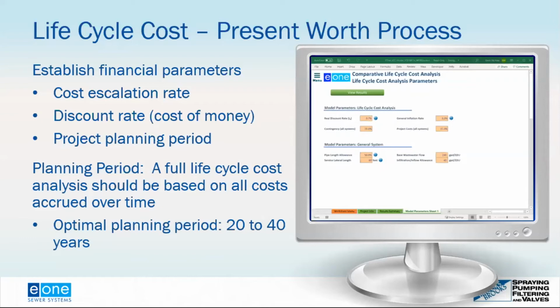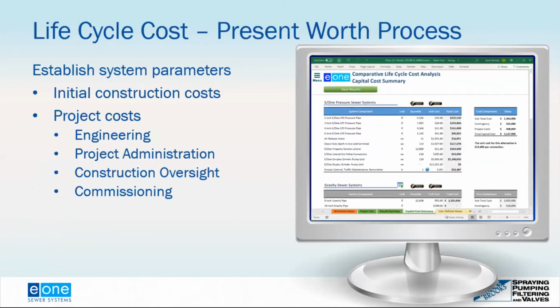What are the interest rates going to be 40 years from now? So you want someone to help you make a decision, but you don't want it to go so far out or be for too short a period that the information you get in is not of any value. So the first thing you do is you go through and establish your system parameters, your initial capital construction cost. And again, this includes the engineering, project administration, oversight and commissioning as your project cost and your